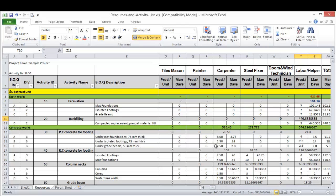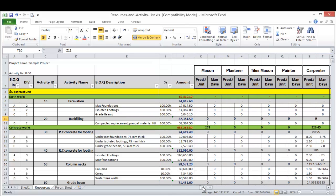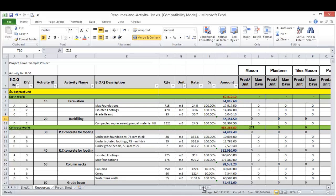So this is a very simple and very straightforward process. Once you understand the formula here, our formula, we fixed the duration so the duration is fixed and we have the quantity, then we are calculating now the required total manpower to execute this quantity.